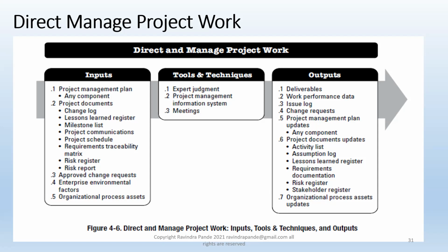So any additions need to be added with the resource, so that he or she can address that task with the other team members as well. Now these type of additions have to be approved, have to be sanctioned depending upon organizational policies and processes. This change control board basically accepts such requests and then guides the project manager where you can add this change request. In a current sprint, normally that's not advisable. In the next sprint, yes, that's normally the best option. And that's how we normally adopt this issue log and change request.